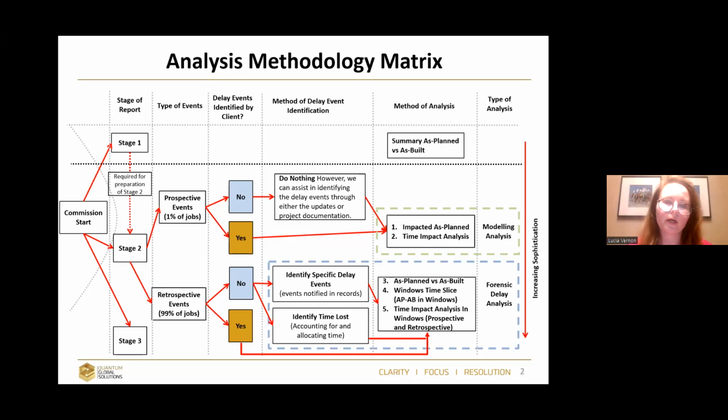The second is when you are working on a project and you receive, for example, a change order. The best project management practice is to prepare a fragment about the change, introduce this fragment into the latest update or into the updated schedule when your delay event started, and prepare a time impact analysis. So every change order should have a time and cost impact. That is what a contractor should do when doing proper project management: assess the time and cost impact just in time. That is what is recommended in the SCL protocol, for example, as well.